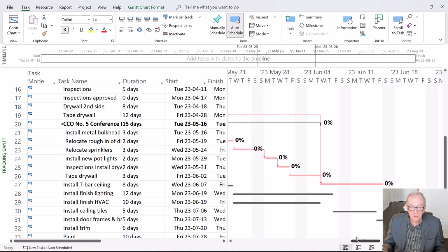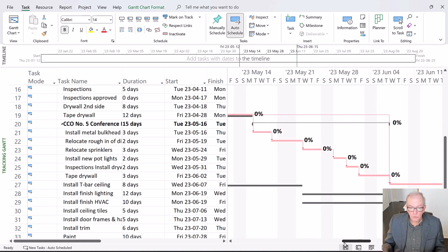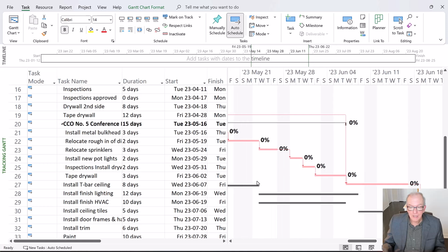Now, again, you notice that there's no baseline here on these activities. There is for everything that was in the baseline, and that's why this is pushed out 18 days. So from this one to the other one, it's 18 working days being absorbed: 5, 10, 15, 16, 17, 18. That's the difference between the baseline and this.